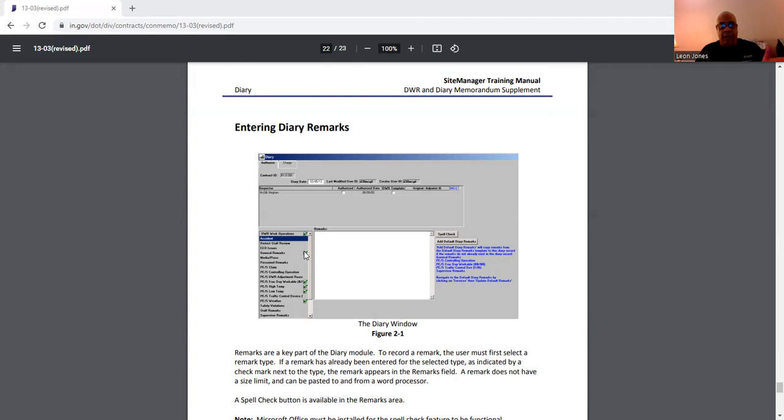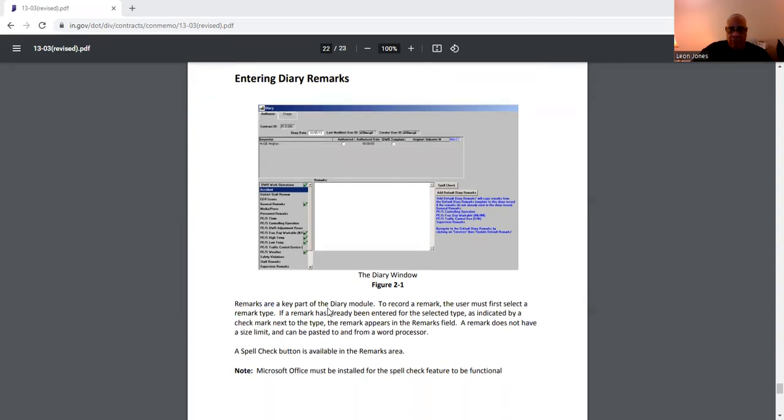who I work with. Like if I work with Fox, what time was I on site and what time they were on site and what time I left and what time they left. And I generally put the daily operation in, and I did the weather, I did the high and low temperatures, all to help the PEPS out. Because proper documentation is very good in case something happens.